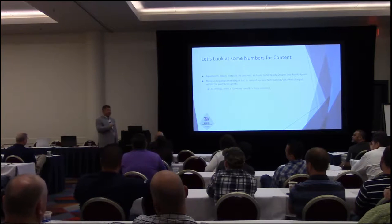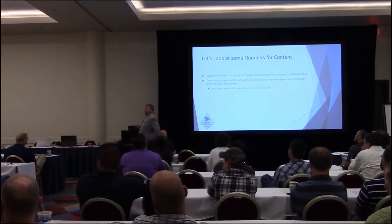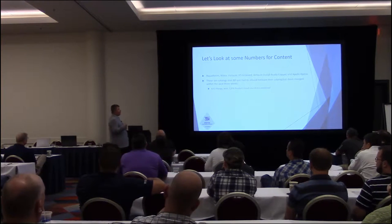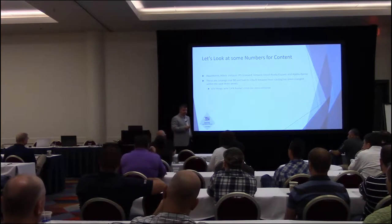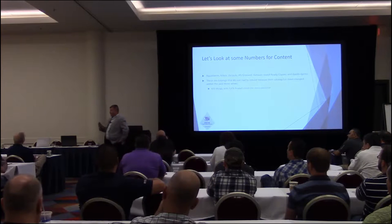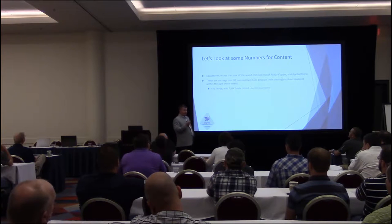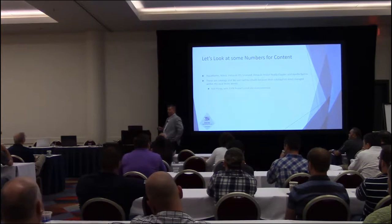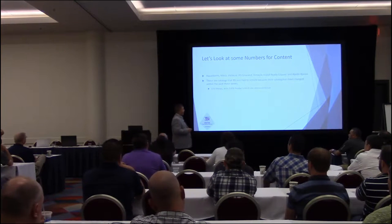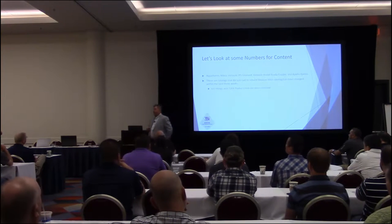The old one's still there. The old one will still be there. And we just set it to discontinued, and now it's up to the individual company to know when that item is no longer deliverable, right? Because they're still going to get it for a while. The supplier may have 300 of them sitting in a crate waiting for this job to start. Well, they're not going to draw with the new fitting. They're going to draw with the old fitting, okay? Now they're going to have a problem somewhere in the interim because they're going to have to switch, right? Where is that going to occur? I can't tell you that. We don't know. But at some point, you're going to have to switch over to that new item, okay?